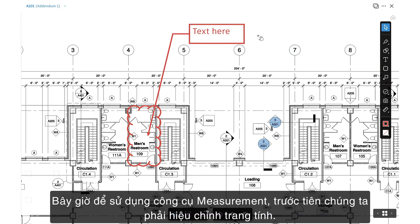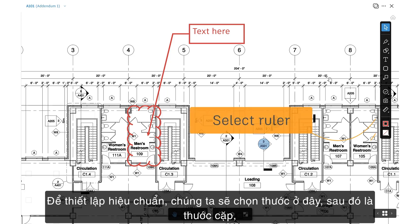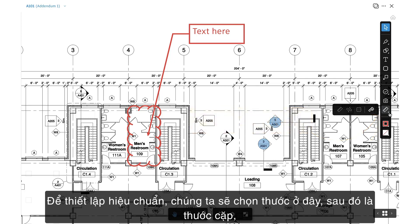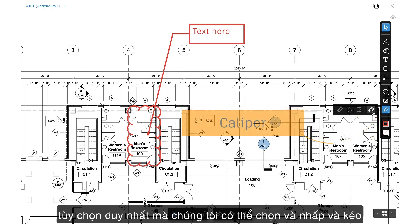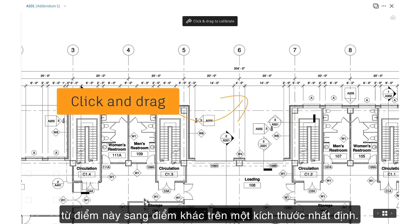Now, to use the measurement tool, we must first calibrate the sheet. In order to set the calibration, we'll select the ruler here, then the caliper, the only option we're able to select, and click and drag from one point to another on a given dimension.